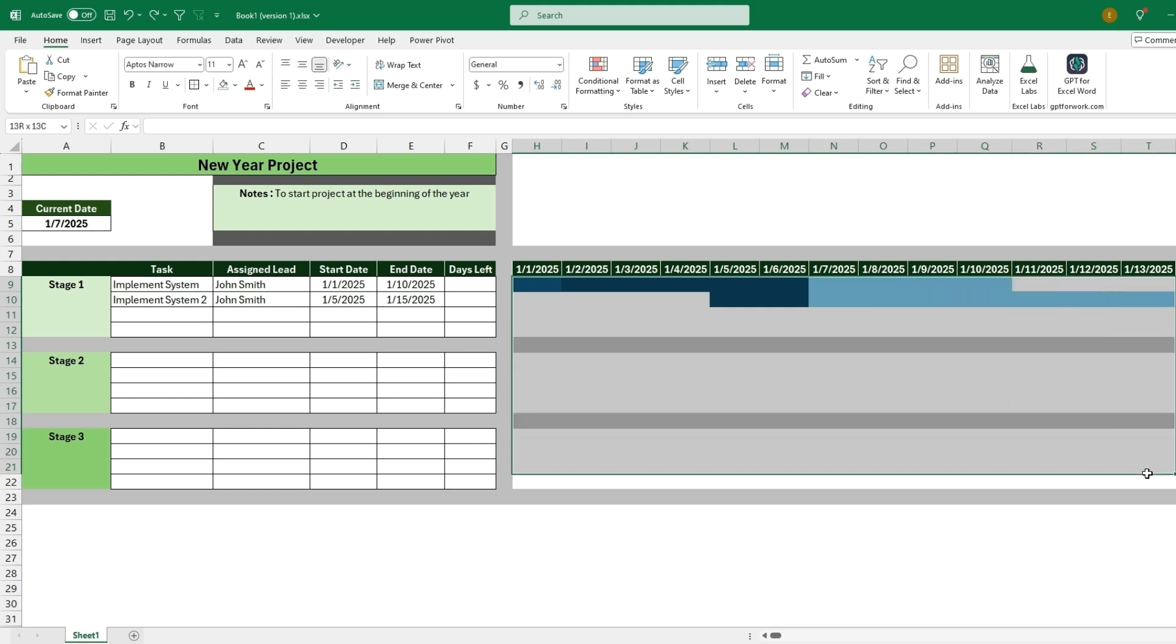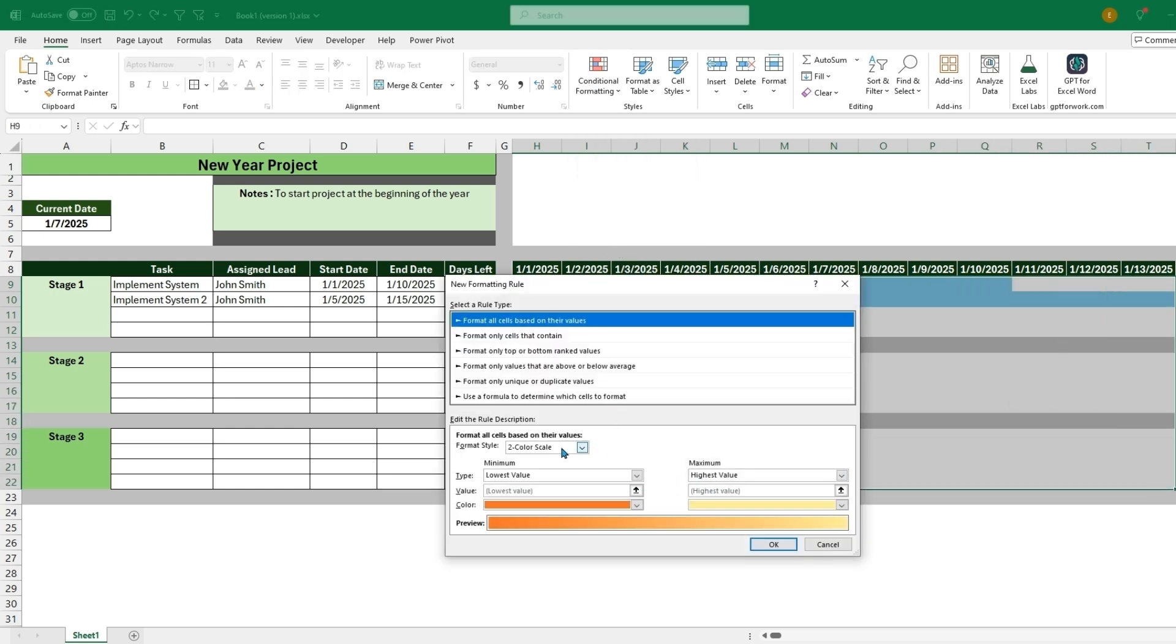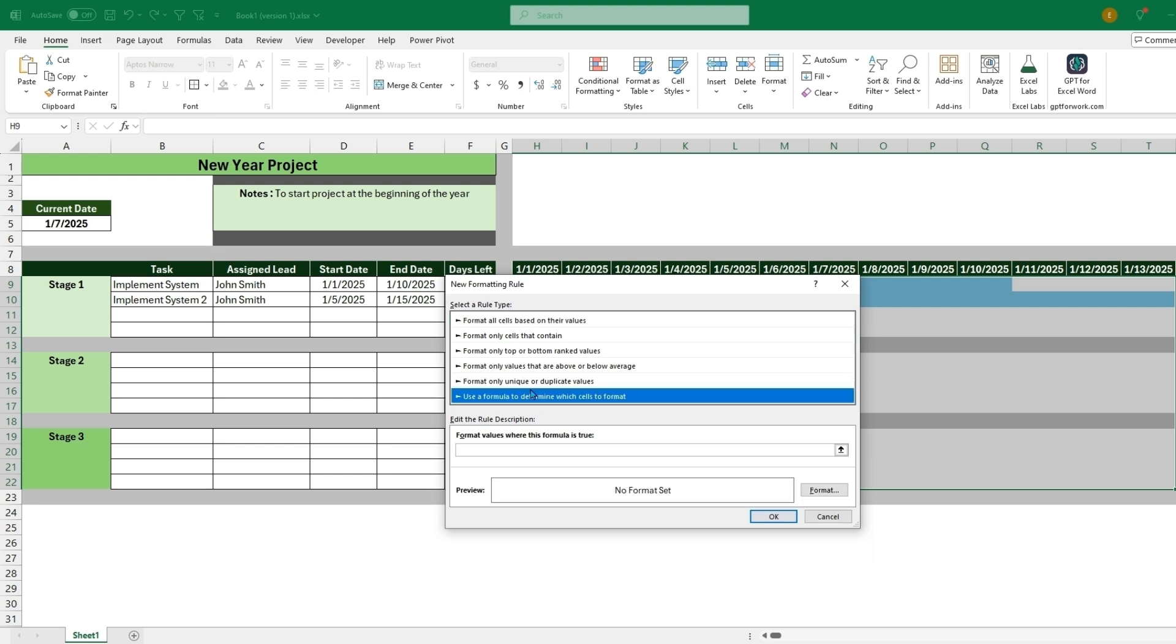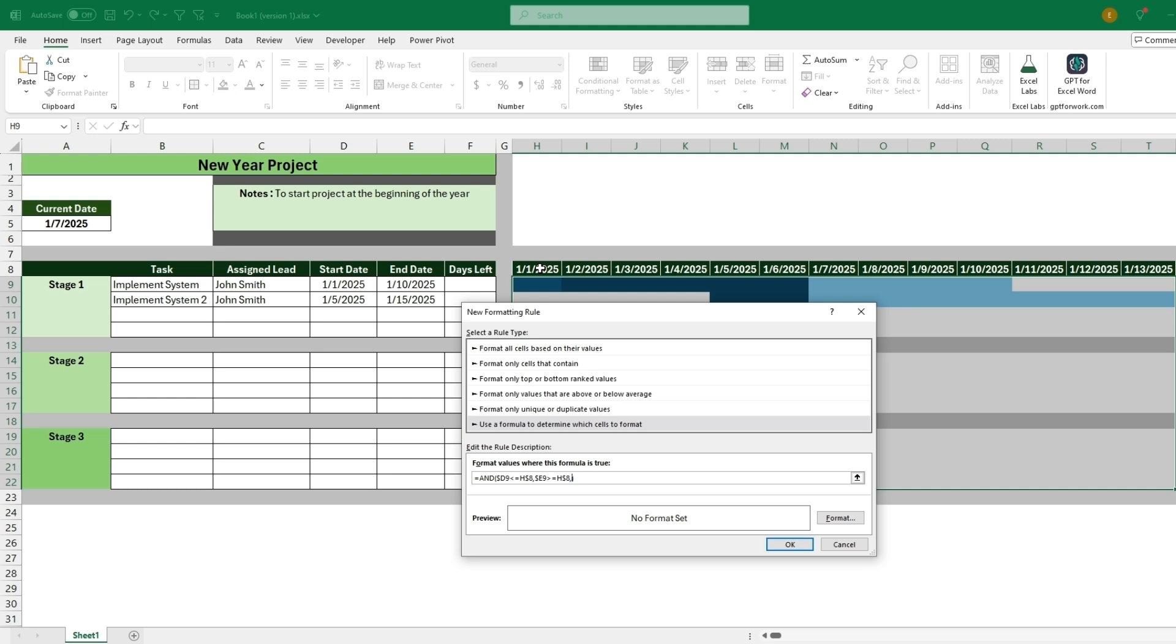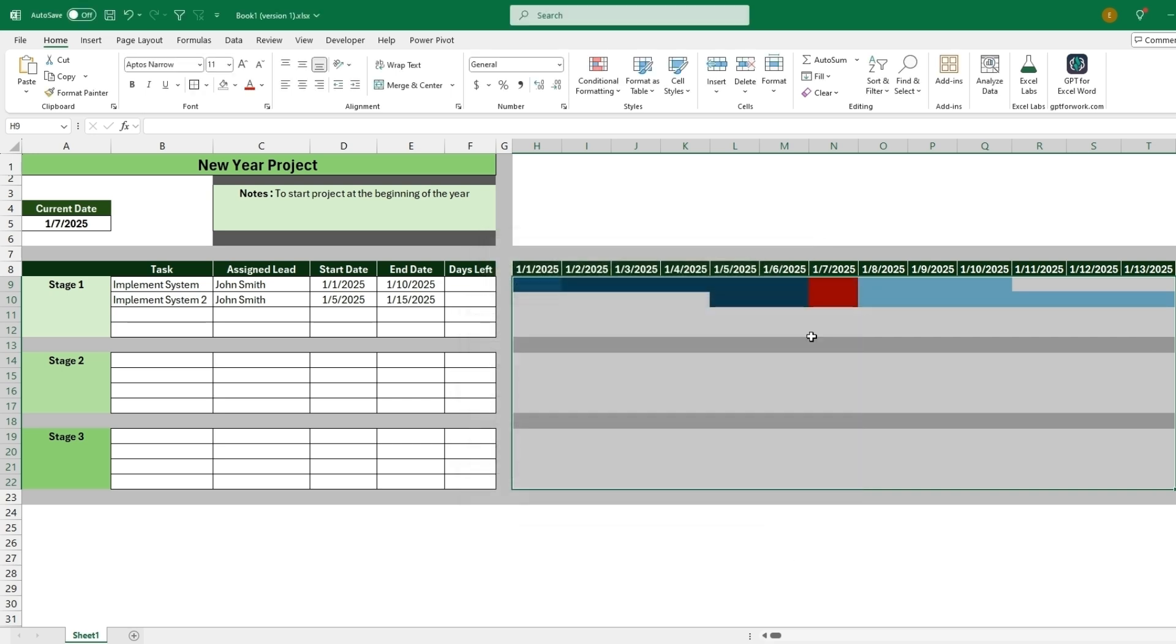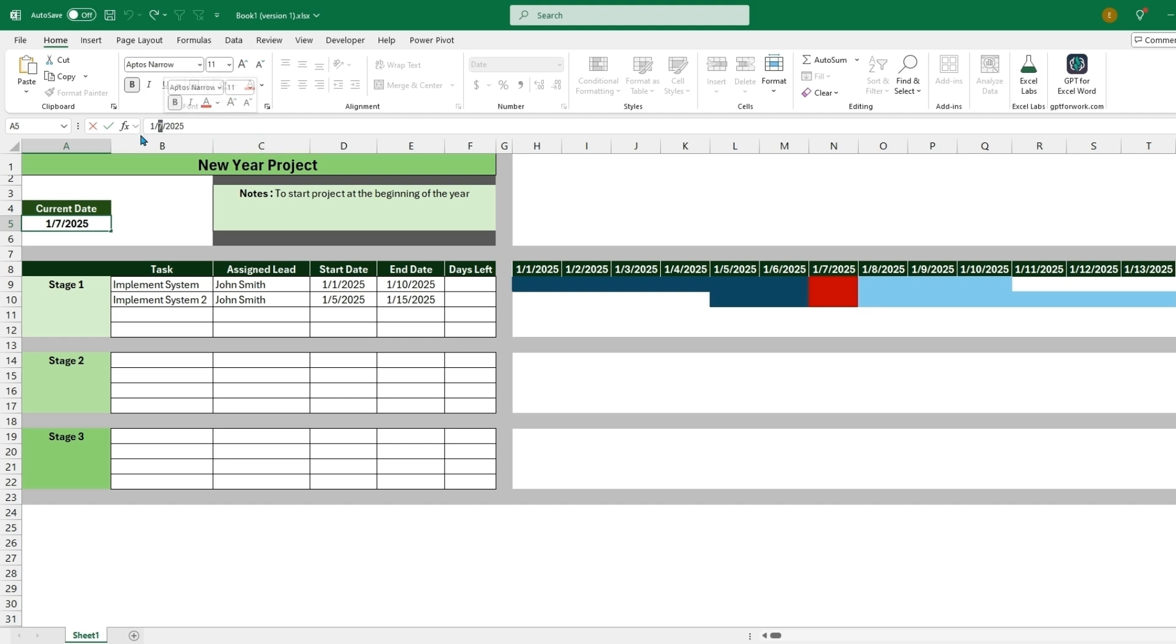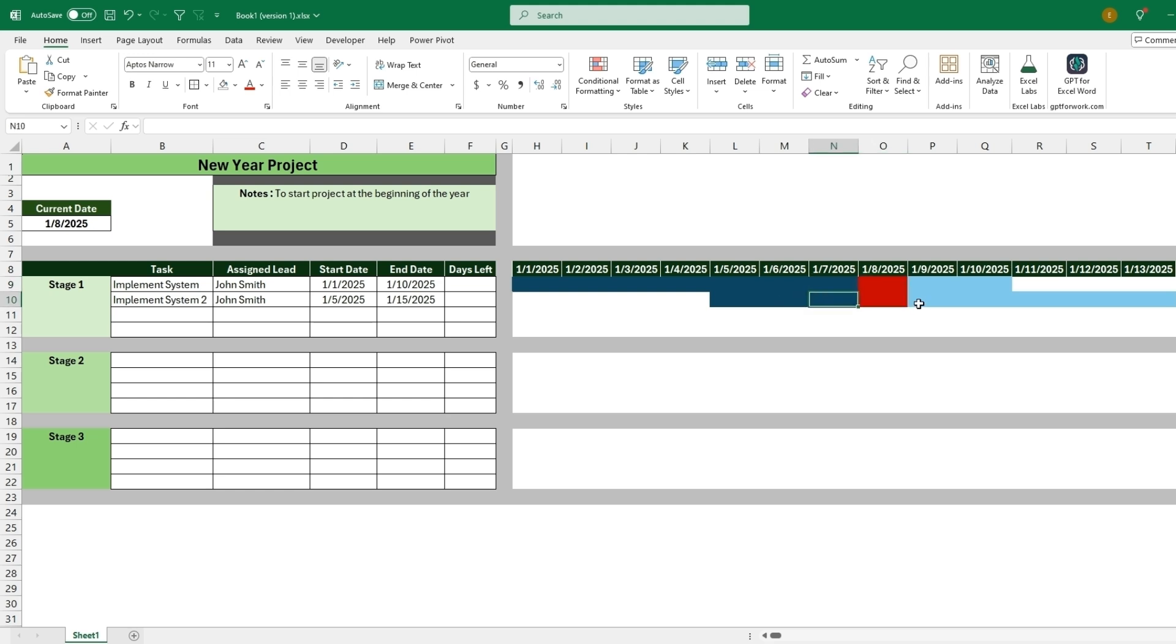So if we grab the same range and click new rule, we can also add a formula. And then this time after the eight, we'll add another comma to create another condition. We can click on this cell, get rid of the fixed column in H, put an equal sign equals this current date. We can set a format, set it to red to really stand out. We'll click OK, OK. And so this will be a really quick way for today's date to stand out. And so let's say we change the current date. This will be a dynamic chart. It will just automatically update to where now it says the eighth is today's date and the seventh already happened. And this makes it an even easier visual indicator of the different dates involved with the task or project.